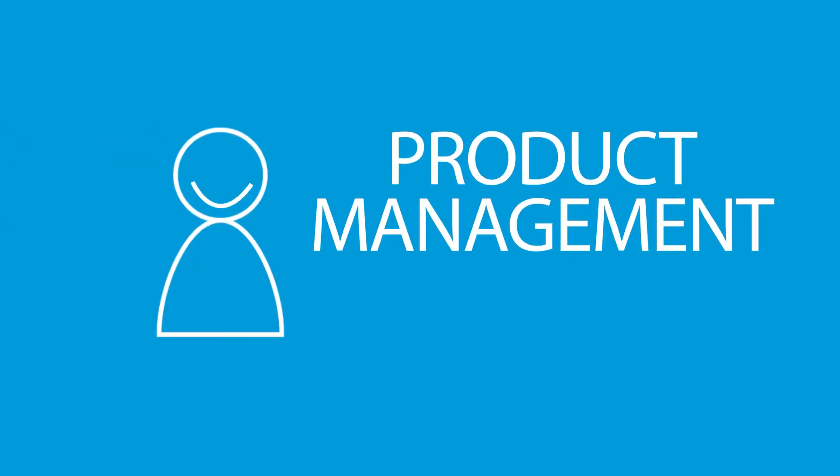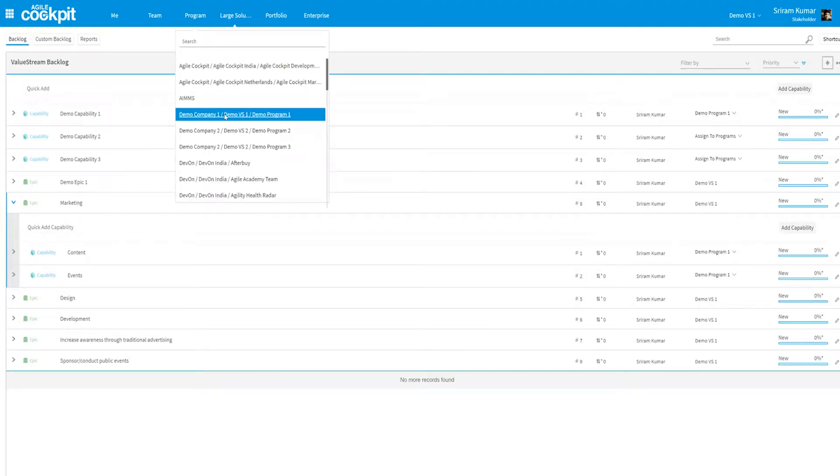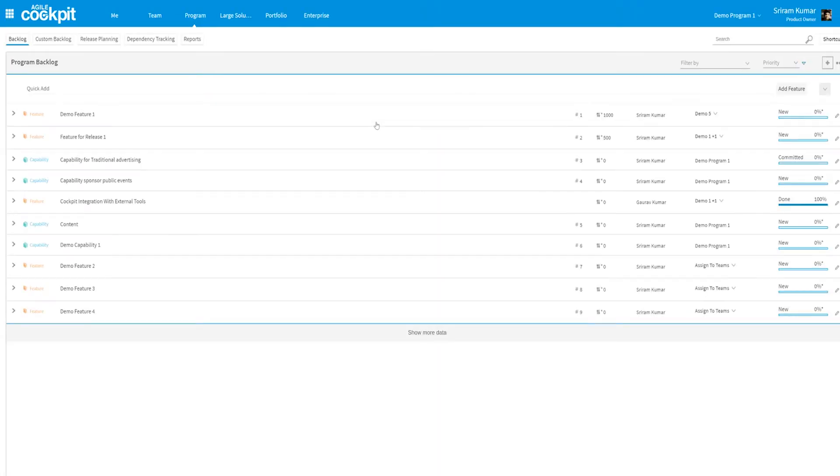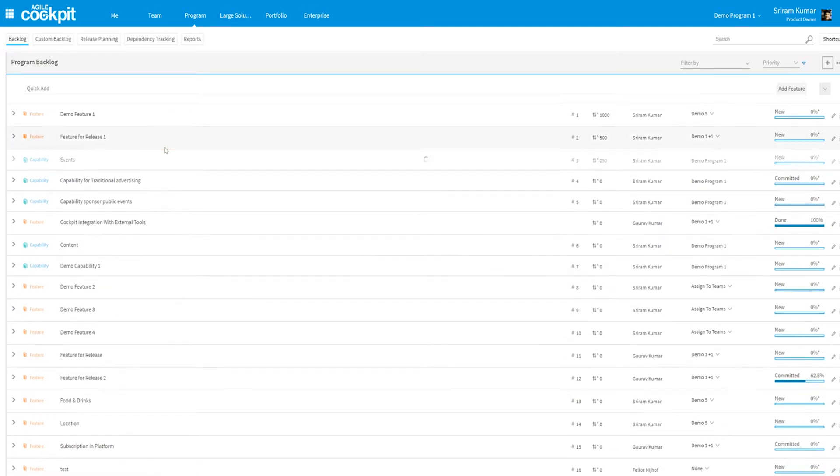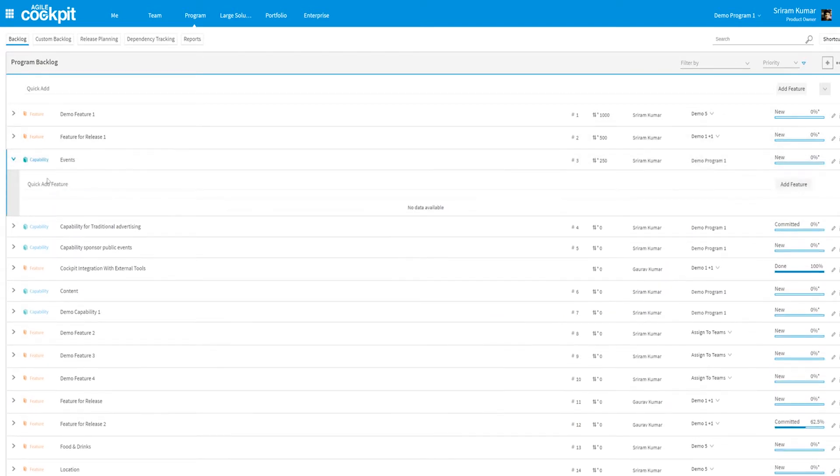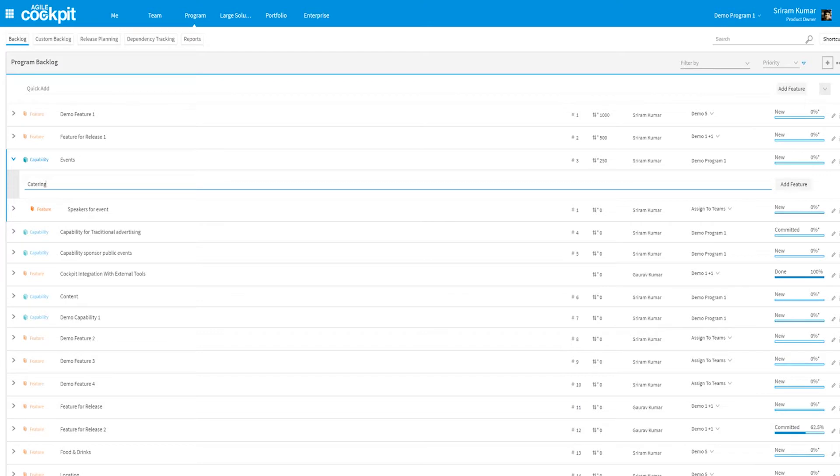If you are part of the product management then the program level is the place for you. Here you can find the capabilities that are assigned to your program, and from here you can create features and assign these to your teams.